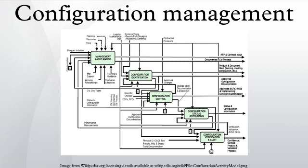Configuration status accounting includes the process of recording and reporting configuration item descriptions and all departures from the baseline during design and production. In case of suspected problems, the verification of baseline configuration and approved modifications can be quickly determined.